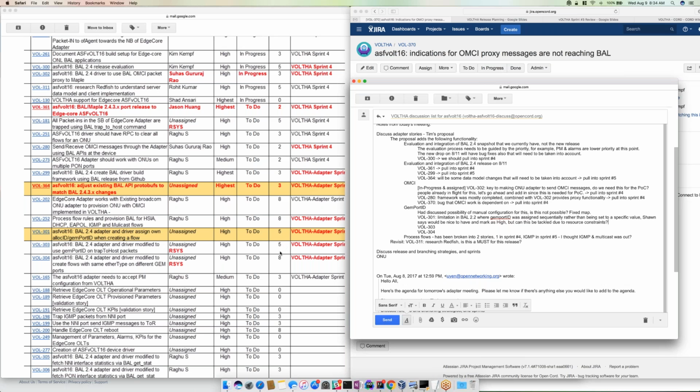So I think part of us evaluating this is, if I look at the story points, we're looking at a week and a sprint for the 3 stories. And so you're looking at essentially tying up 2 resources for a whole sprint, if that is accurate. It might not be accurate.